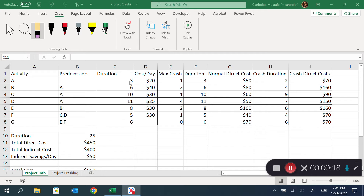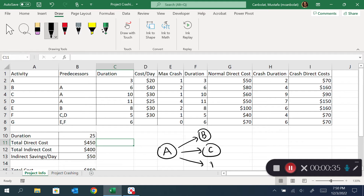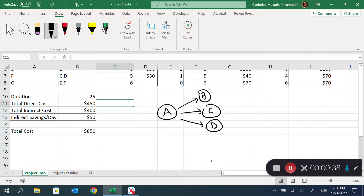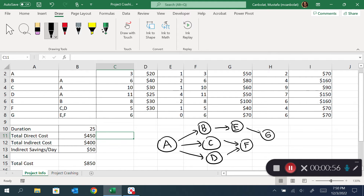I'm going to start building my network diagram. Activity A, then activity B follows A, activity C also follows A, and D also follows A. After that, activity E follows B, F follows C and D, and finally G follows E and F.